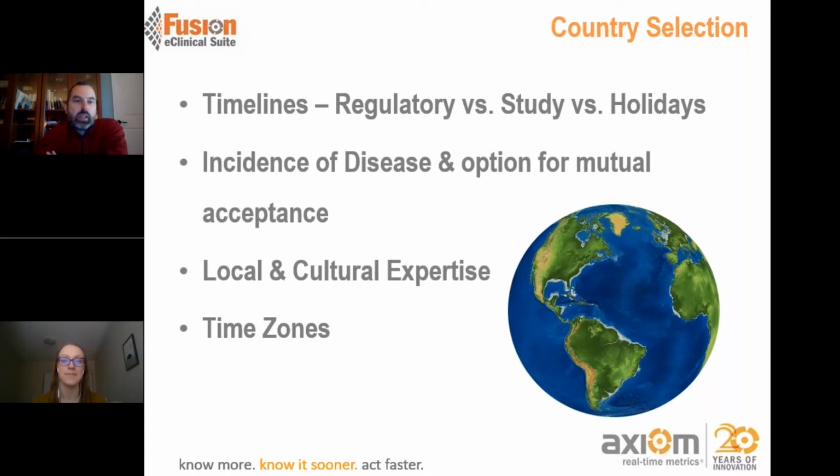It sounds kind of obvious, but summer in Europe tends to be a quiet time for regulatory approval submissions, not so much in North America. But as we move towards the end of the year, you'll find that Thanksgiving and the holiday period around December tend to be a slower, event-driven time in North America than in Europe. By knowing those differences, you can apply that knowledge to a global study and build a critical path for your study timeline, which factors in the regional differences and similarities.